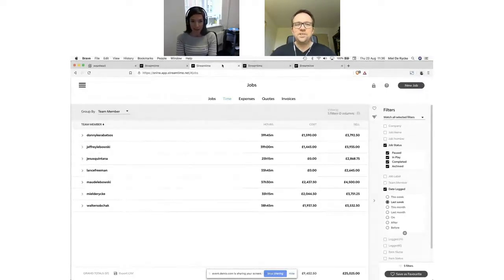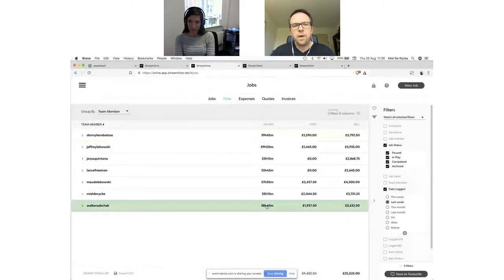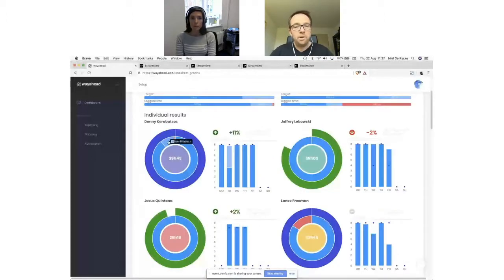So yeah, go ahead. Looking at a timesheet report in Streamtime, this is my team's time from last week, grouped by team member, of course. What I felt was missing here is you see the total, but a lot of studios work with billable and non-billable time. They want to see that staff reach up to a certain billable amount of hours each week, and so that's what I did with Wayahead. I break down the time entries into billable and non-billable.